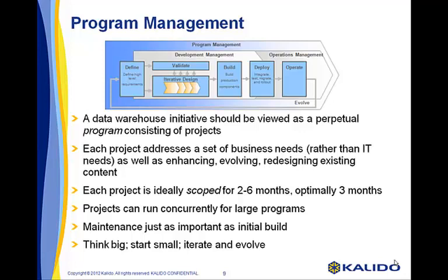Fixing the time and resourcing also means that you can be a lot more predictable on both budget and delivery time. From a time perspective, you need to choose a time period that is short but reasonable for your organization. We use 3 months as the average. The reason for this is that it forces you to deliver concise pieces of functionality.